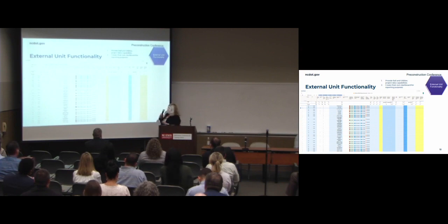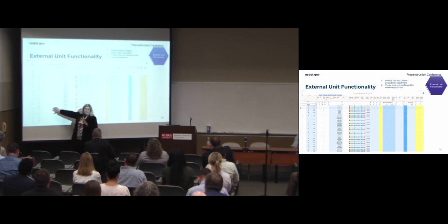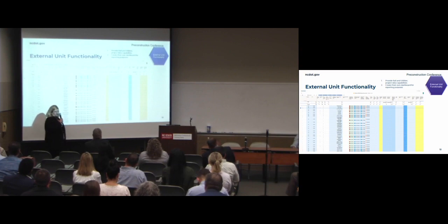So when you put in a utility parcel, you can also put in the date that you have to buy it by. So it'll also produce for you, did you meet that date? Did you not meet that date? How many of your parcels did you meet by the utility relocation date or by the utility acquisition date? So there's a lot of different ways we can use this with other groups to help them, so that we also don't have to send emails and calls about what's this project, what's that project. They can come straight to here and get it.